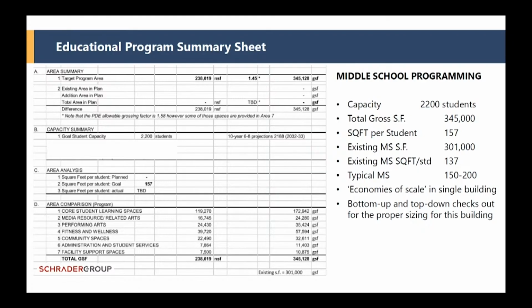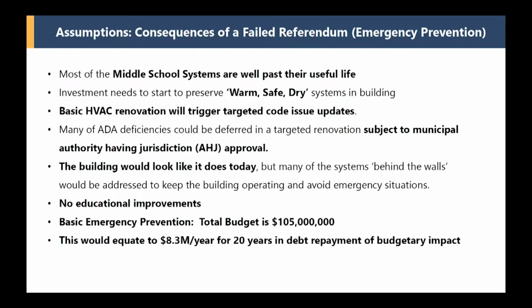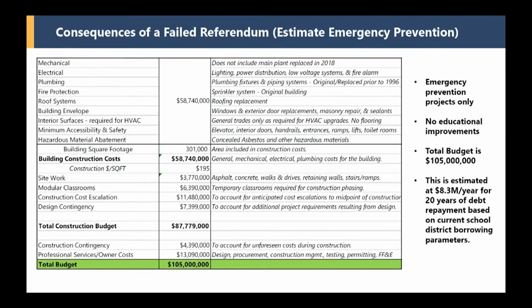I have a question. For the renovations, when you have the systems, electrical, plumbing, and I think it was something else there. Mechanical. Would that include what I think is called pre-code requirements? You used that language a while back. Would that satisfy the pre-code requirements? It would satisfy, anything that will touch will have to be to current code.